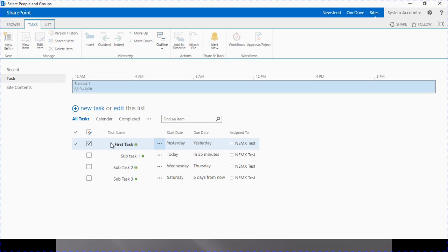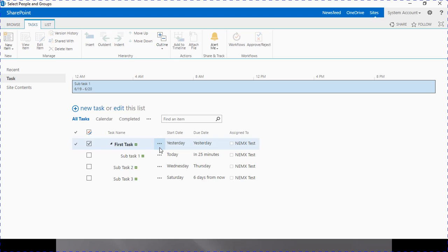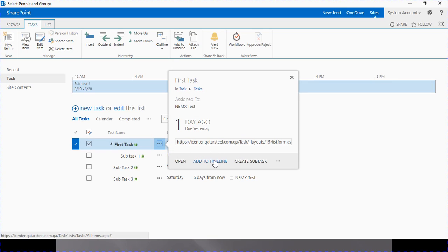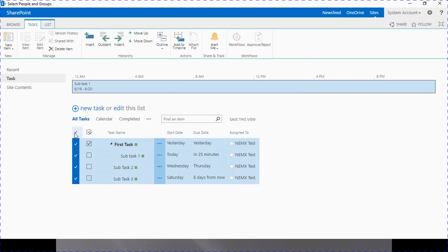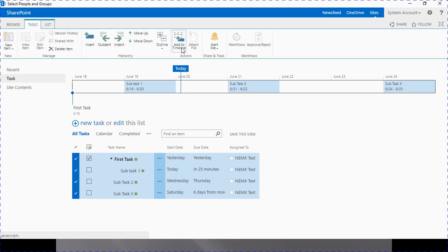The next feature we will look at is the timeline. As mentioned earlier, this is one of the interesting features added to tasks in SharePoint 2013. Each task list now has a default view containing a graphical timeline at the top of the list. When a new task is created, you have the option to display that task on the timeline. When you click the ellipsis next to a task name, a pop-up gives you the option to add the task to the timeline, or if already added, to remove it from the timeline. You can also select all tasks, go to the Task tab in the ribbon, and click 'Add to Timeline' — all tasks will then be shown in the timeline graph.